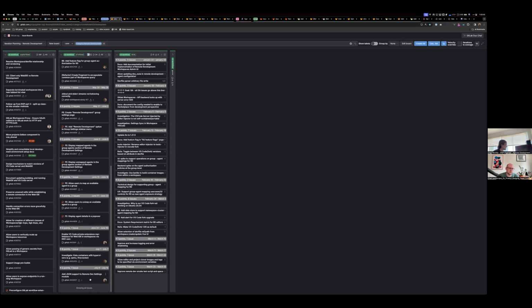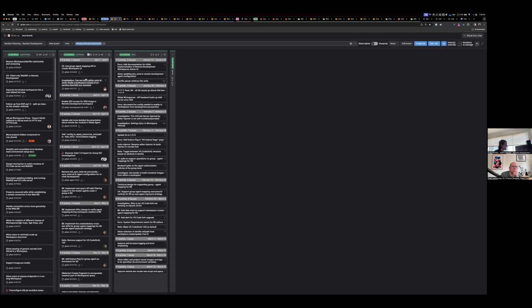And then it will show up without a weight, and then it will get discussed and weighted during the next IPM. There's a lot of magic that happens in the IPM, and the reason that it's sync, it also gives everybody eyes on what's going on, at least seeing the issue discussed for up to 5 minutes, to bring their experience, their blockers, to bring up issues that may not have come out in refinement, that may be problems or things we need to be aware of.